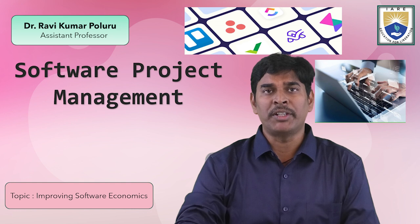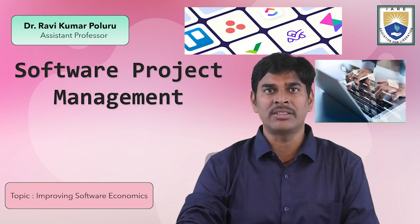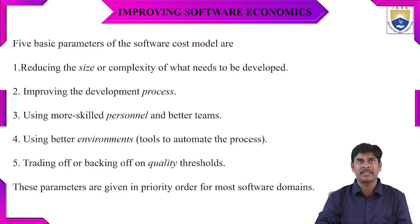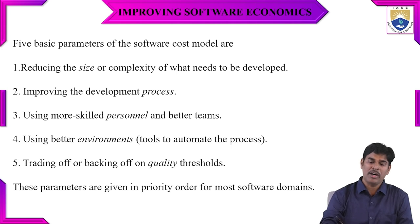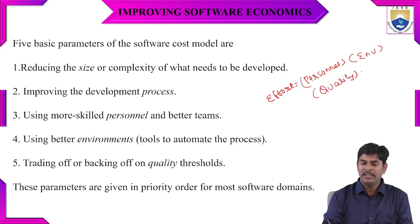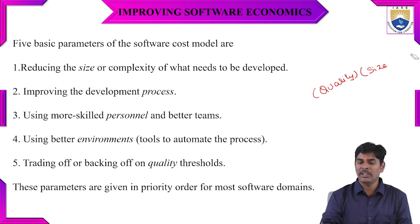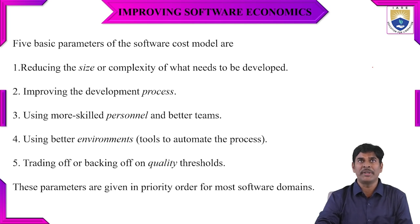Good morning. I am Dr. Ravikumar, working as assistant professor in the department of information technology. Today we are going to discuss about improving software economics. We know that we calculate software economics using the formula: Effort equals Personnel times Environment times Quality times Size raised to the power of Process. These five parameters are used to estimate software cost.